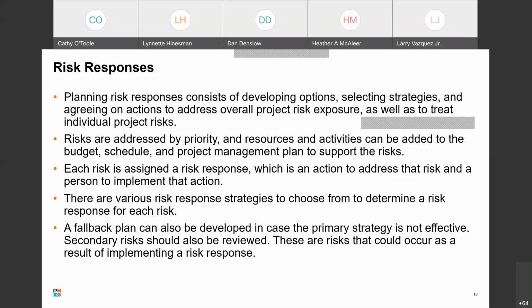So your fallback plan is typically to back it all out, because your primary strategy was to test. You got user acceptance, and they tested it all and said it's approved. You put it in, and it doesn't work the way they thought it would. So having a fallback plan in that case would be backing it out of the production system and taking it back and analyzing what happened.